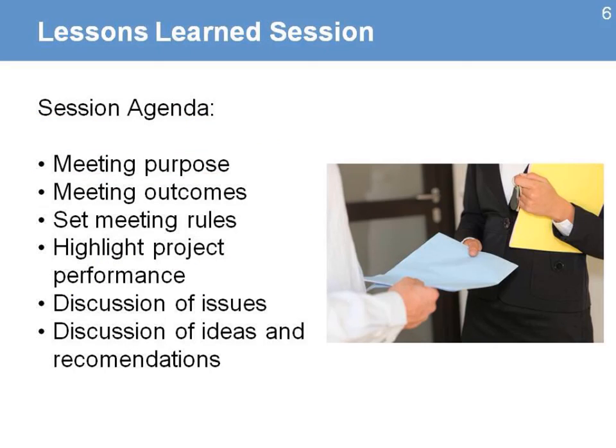With that information, then you need to create and set your agenda. You will need to make sure that there is a purpose and specific outcomes that will come out of it. You also set the meeting rules. In the sessions, you need to explain that it's going to be an opportunity to highlight project performance, process of discussion of all the issues in the project, and ideas and recommendations.